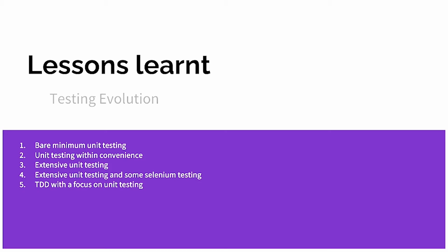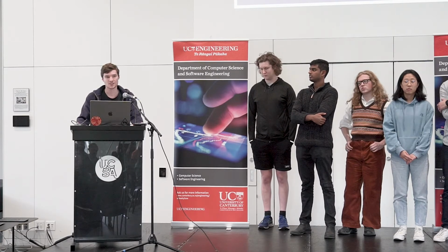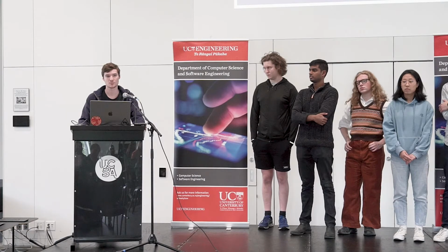After this, we worked on adding Selenium testing to our project, but we found that this took a lot of effort to keep up to date with changes we would make. So we eventually cut back on this and focused on test-driven development with unit testing. In our sprint planning, we identified the tests we wanted to pass for each of our stories before implementing anything, and this helped us to increase the quality of our product.